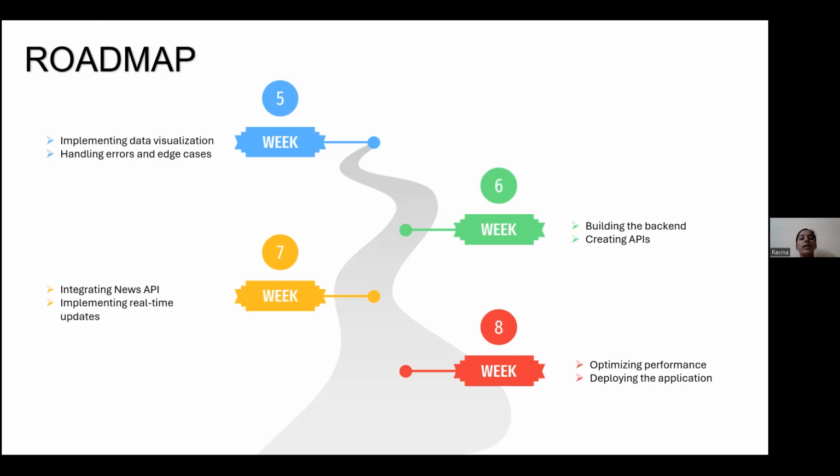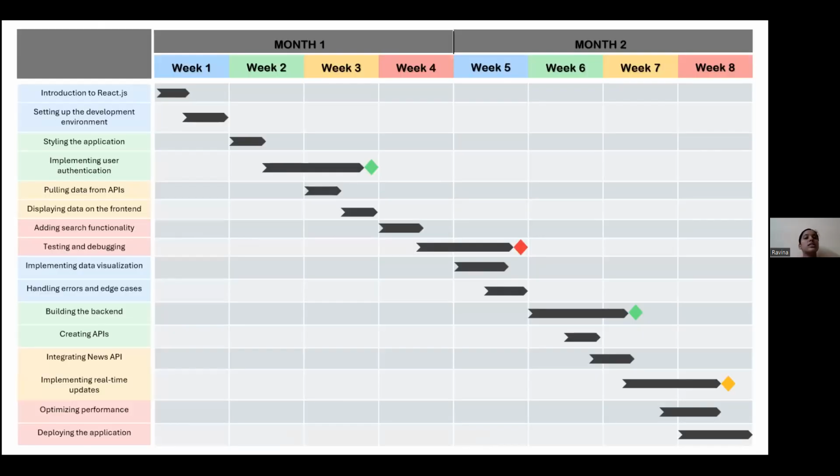As we are not doing any deployment in the previous stages, we are going to deploy all the tasks together in the last week. So it may be tedious work and we can expect more risk and errors to be found in the deploying part. So we have to save time for that. So this is a simple Gantt chart I prepared through a PowerPoint table to give a picturized, simplistic view.